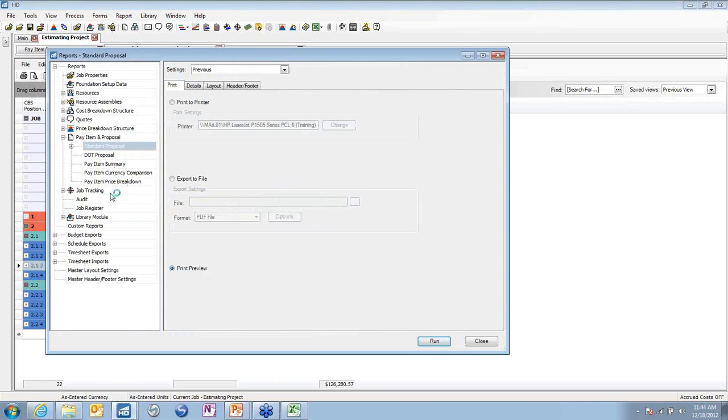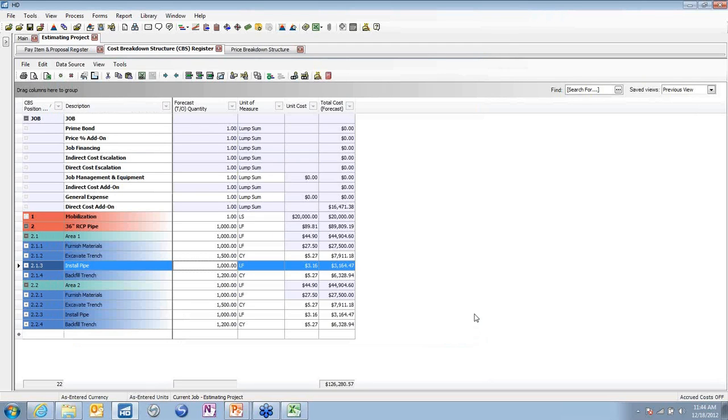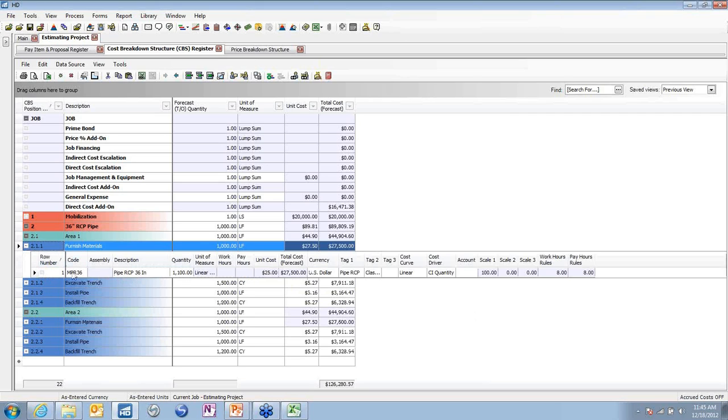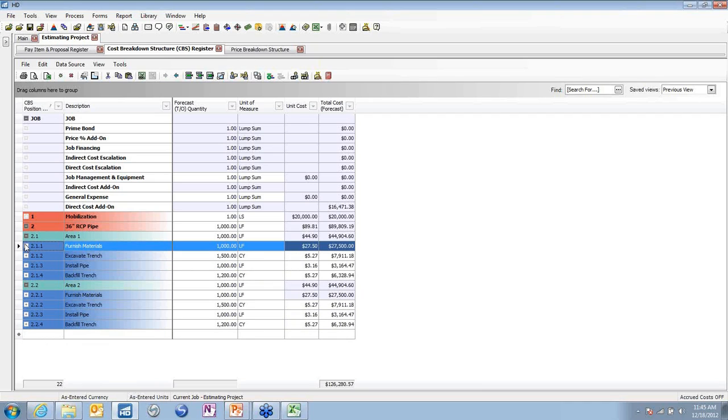We looked at one of those where it was in a lot of detail, where it showed the full breakdown of the price. Now, getting down to a resource level, the price per resource, that almost sounds more like a time and materials kind of example. And HardDollar does have the ability to handle that type of work, where you are looking at maybe the invoice that you're going to give to the owner with the listing out of all of your resources and their billing rates. You can define what that billing rate would be at the resource level. Instead of the cost for a resource, you would have a price per resource.